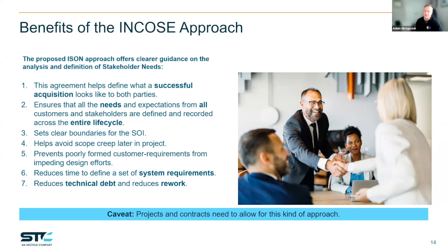One issue that happens is if you fumble the starting point on a project with the stakeholder needs and that initial requirement analysis and initial needs analysis, it builds your project on unfirm ground. And that creates a lot of technical debt because you're always having to go back and add things that you might have missed and revisit those things, which have propagation across your project and cause a lot of those headaches